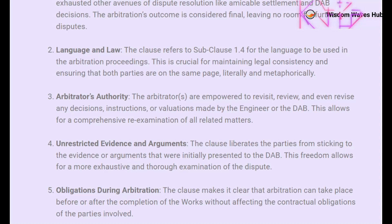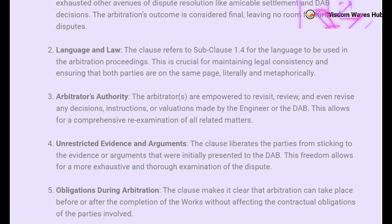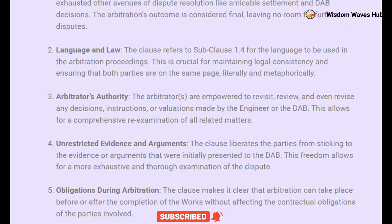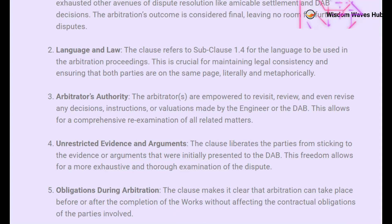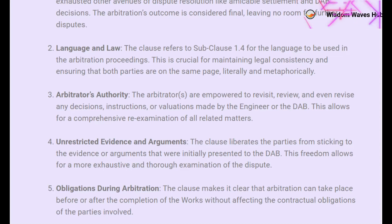One of the unique features of this clause is that parties are not restricted to the evidence or arguments that were initially presented to the DAB. This freedom allows for a more exhaustive examination of the dispute, which could be beneficial, but may also extend the duration of the resolution process. It's crucial to understand that the arbitration can take place either before or after the completion of the works, without affecting the contractual obligations of the parties involved. This flexibility is often lauded for its practicality, but also poses potential operational challenges.